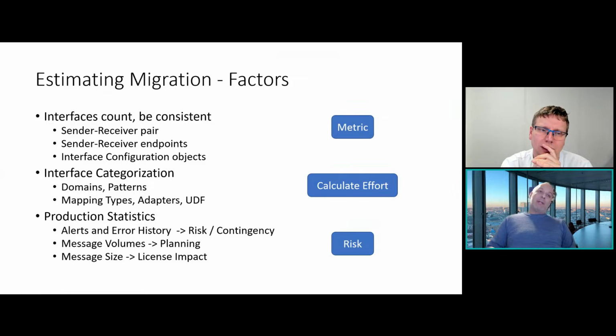On the consultancy side, many times it is a commercial item. Some salespeople, or when it's a big consultancy house, some salespeople will bring the leads and ask the architects to estimate it, and then comes a very awkward conversation of costing. They ask for breakdowns of the hours and many times start negotiating: oh, that's too many hours. I think the first thing I want to say is that it's important to find your metric for what you're going to price in terms of costing. What is going to drive your effort, whether it's internal or external?